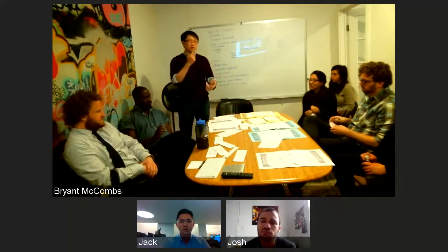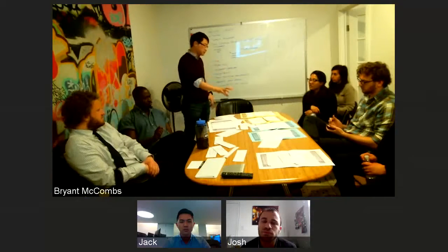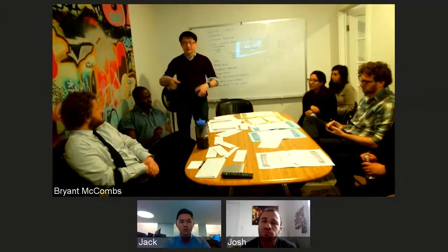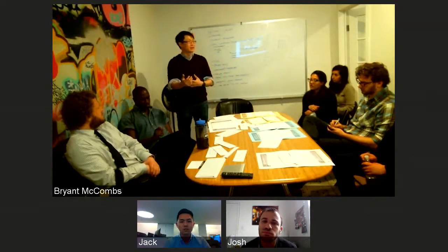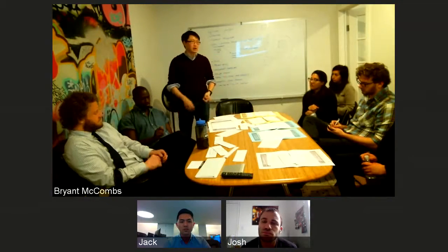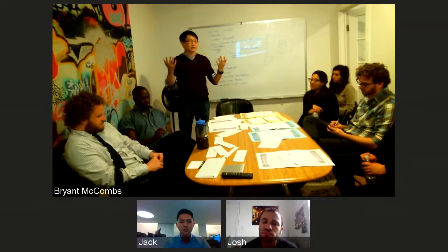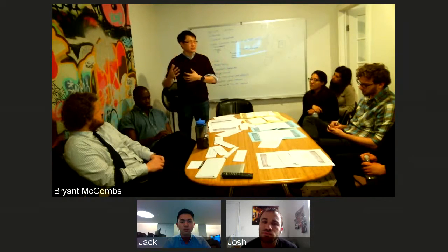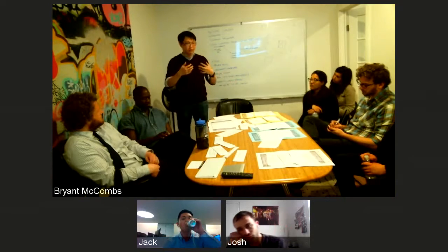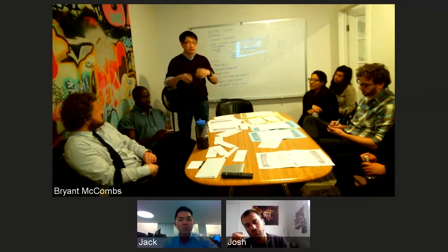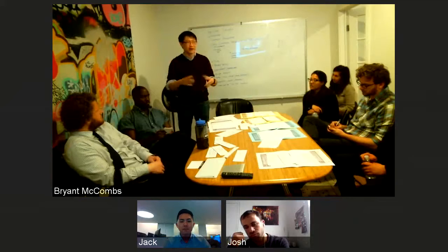They are all usually written from Kathleen's point of view, so the only way a card is actually useful is if Kathleen can see something at the end of it. So cards that say technical jargon, like clean up the bus in the background, are not usually useful. That could be the technical implementation of a card that says improve Kathleen's load time on her Dell 2600 laptop by 4 seconds.